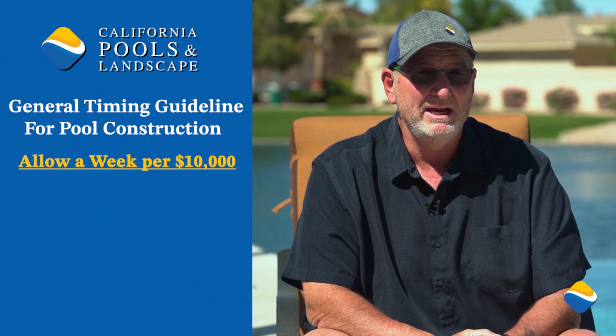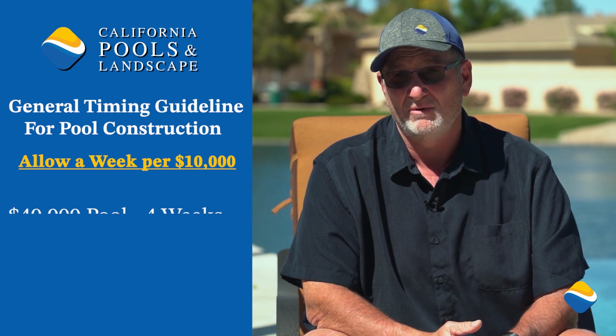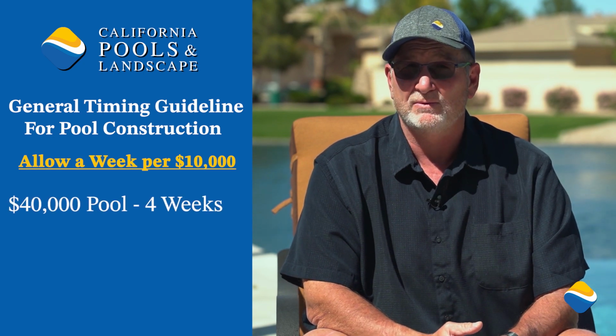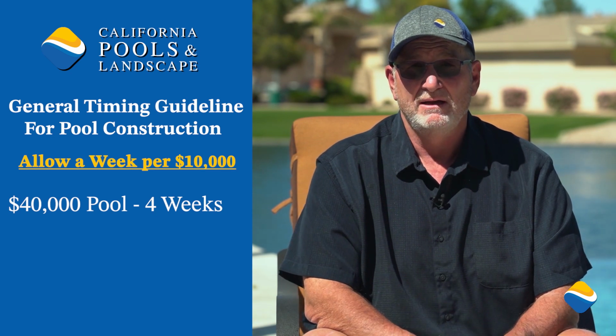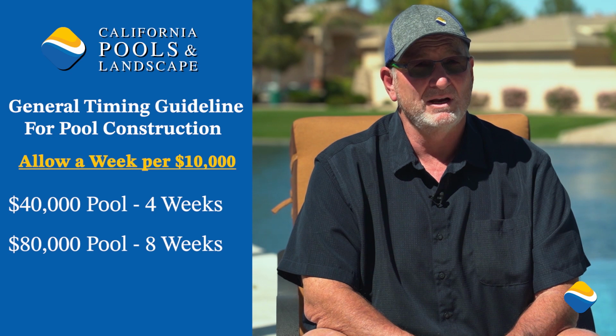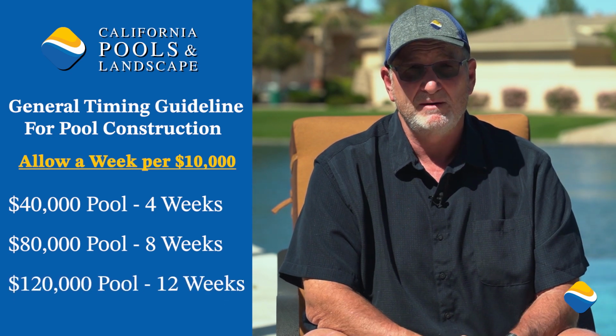A general guideline though, because there's such a vast difference in scope of work, is to give yourself about a week for every $10,000 worth of work. So a $40,000 pool, we can build it in 4 weeks with minimal changes, great plan, and we roll right through it. An $80,000 pool, more like 8 weeks, and of course, a $120,000 pool can have a 3-month construction time.